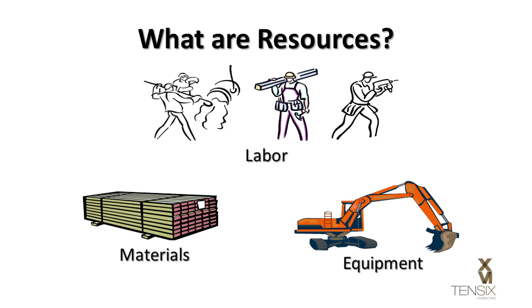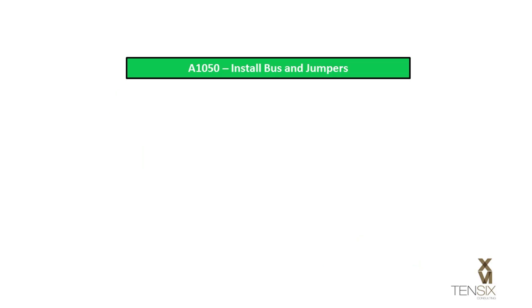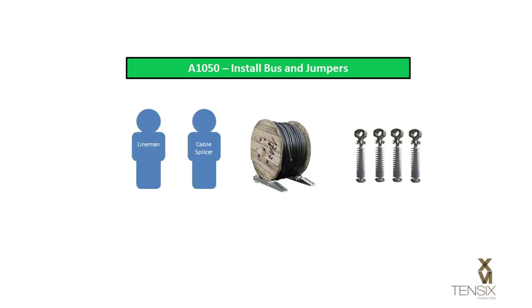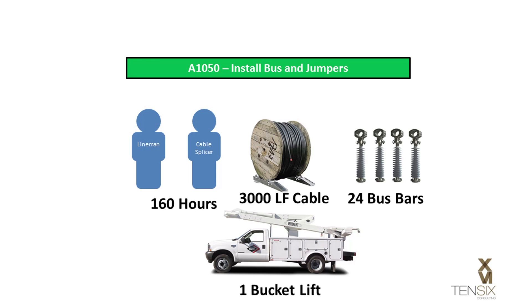In Primavera P6, resources can be assigned to activities. While a schedule activity describes a piece of work to be performed, a resource assignment describes the skills, materials, or equipment that will be required to complete the work. It also describes the number of hours or material quantities needed.